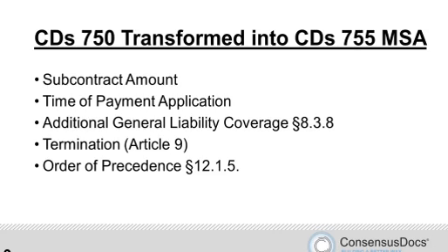We also had to do the same thing essentially with the timing for payment applications. That is the decision we made. So that is something that will ultimately need to be addressed in the project work order. It is not specifically addressed in the 755 as a default, though certainly, given that parties can modify these documents to their particular purposes, if you're more comfortable having a defined time for the submission of subcontractor payment applications, you can define that in the master if you so choose.